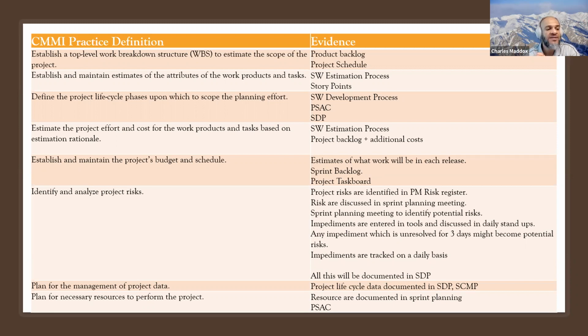So we base our projections, our planning, on reality. And that way we can also produce our documents in the same way, based on the actual reality that's happening, and still meet our compliance and regulatory requirements with minimal waste. That's the thing that you're trying to avoid, because if you do big upfront planning prematurely, a lot of that's probably going to go to waste, because that's not the actual evolution of what the project's going to see down the road. We need to be more iterative and just make the real-time updates as needed to follow the short-term plan, the release plans, the iteration plans that we know.